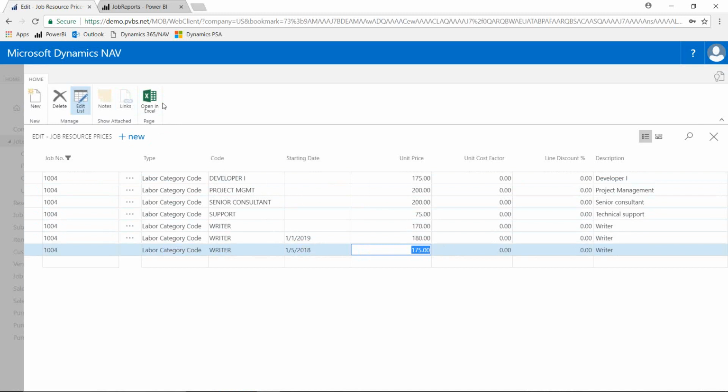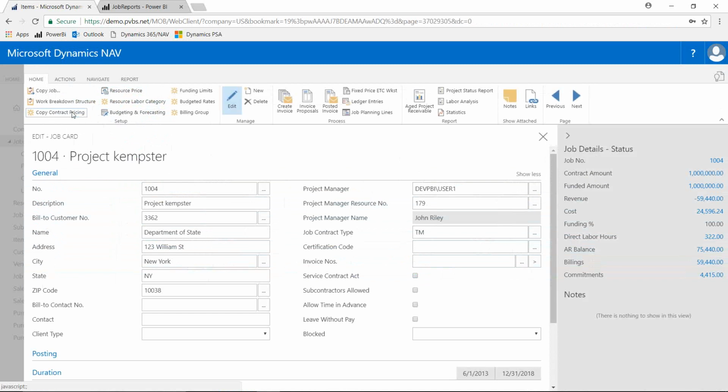When it comes to billing T&M projects, it limits or eliminates rounding issues because for that timesheet period, it brings in the number of hours at a particular rate. It doesn't bring in each particular entry. It summarizes it from a billing perspective, but it keeps the detail from a timesheet perspective. So people really like that.